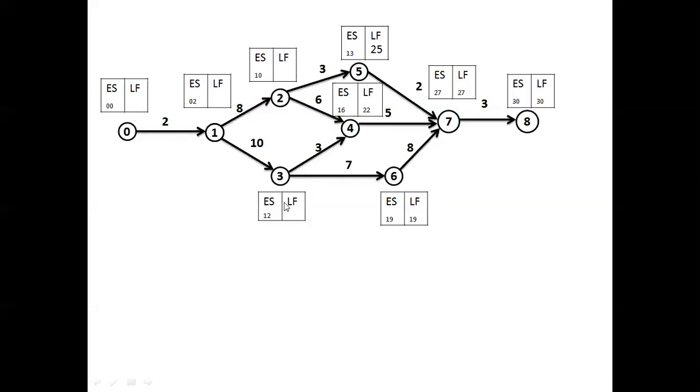Then next we'll go to this, where there are two outgoing activities. The latest finish time is the one which is a minimum for the outgoing activities.